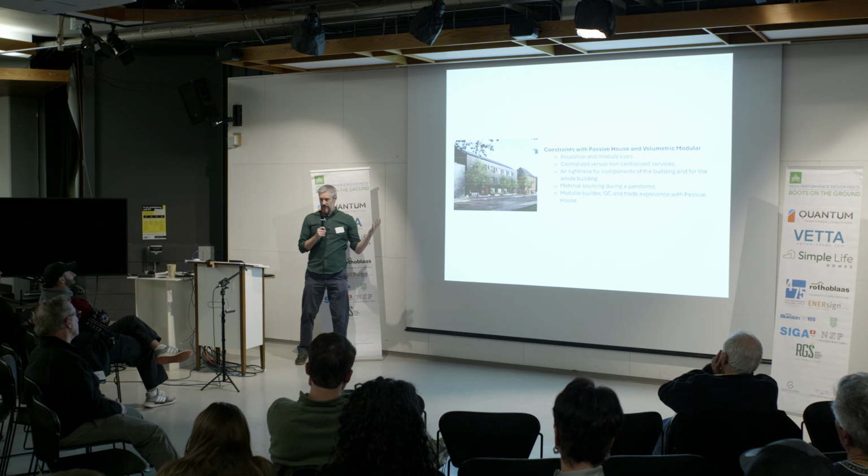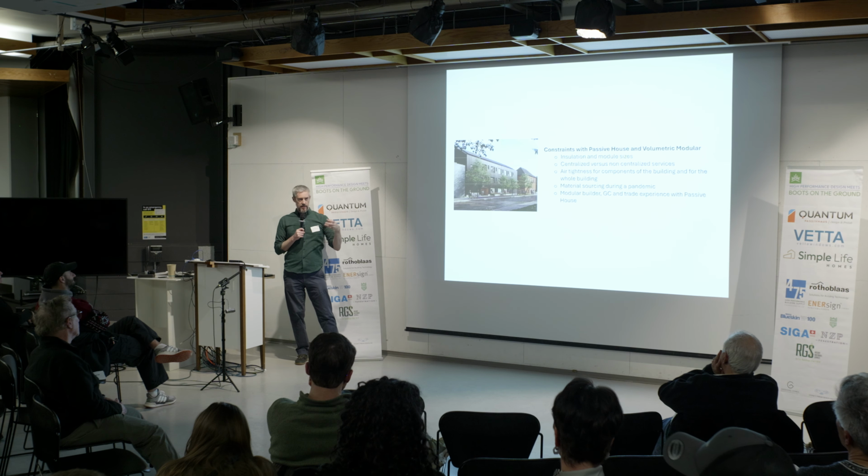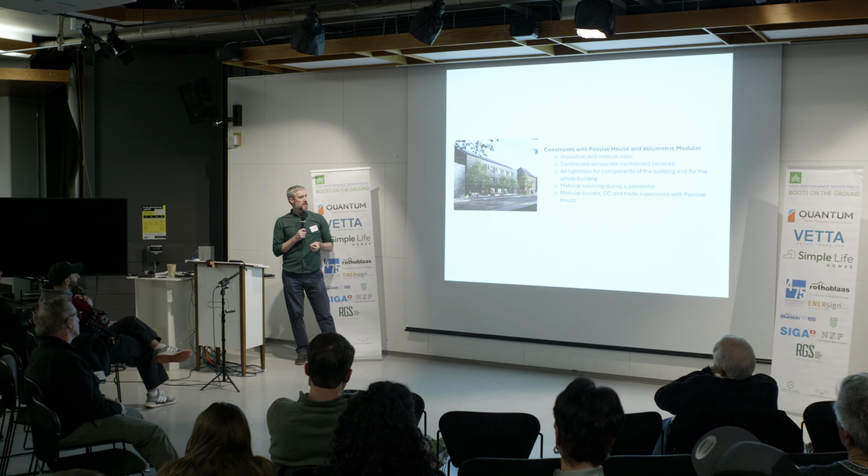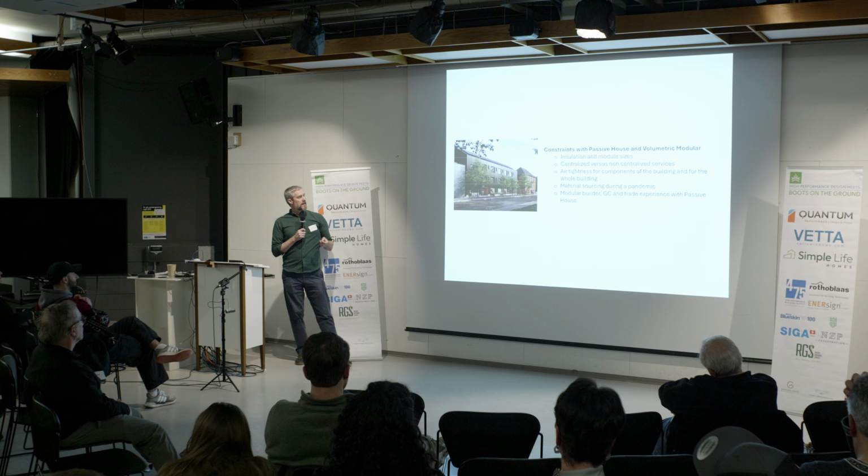But ultimately, with Passive House, you can't just test a module individually. To get your certification, you're ultimately delivering a whole-building airtightness test.